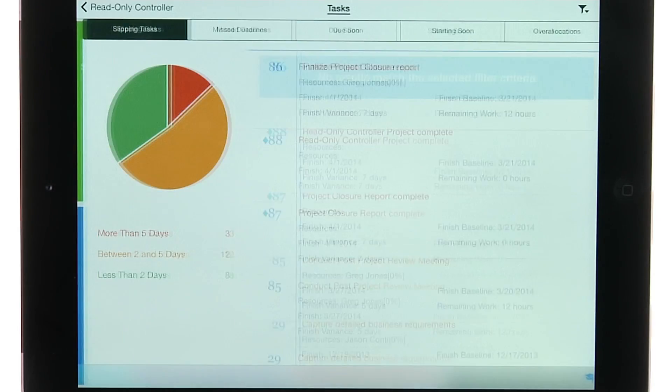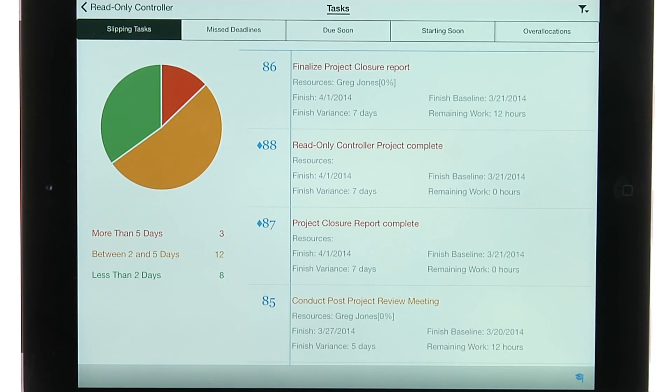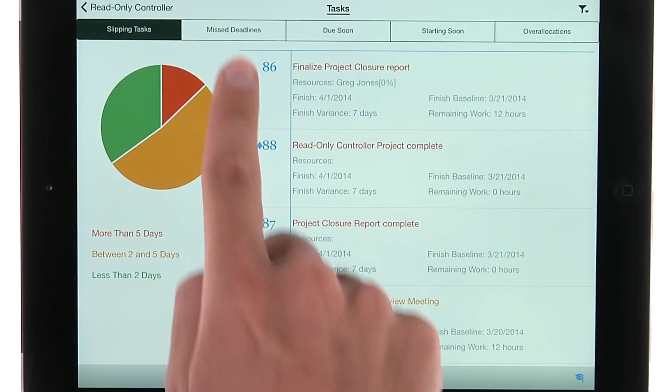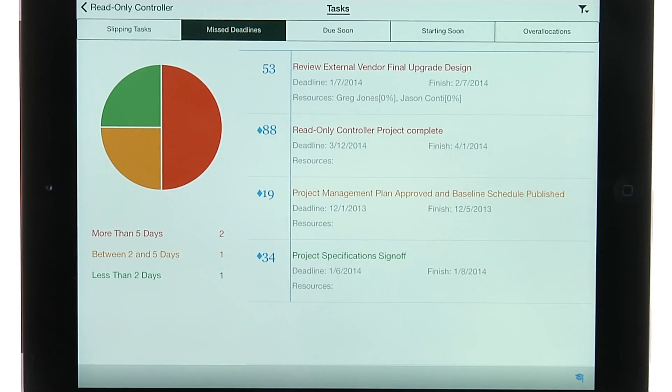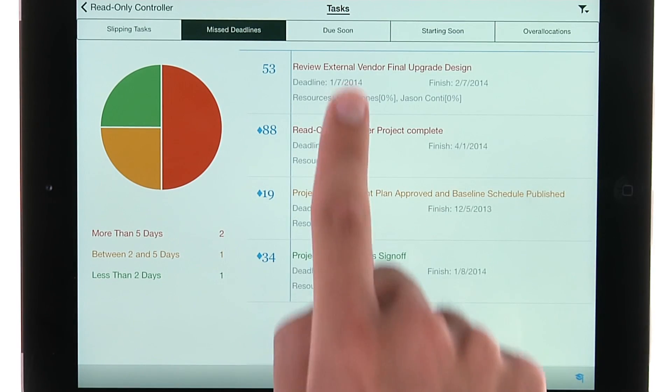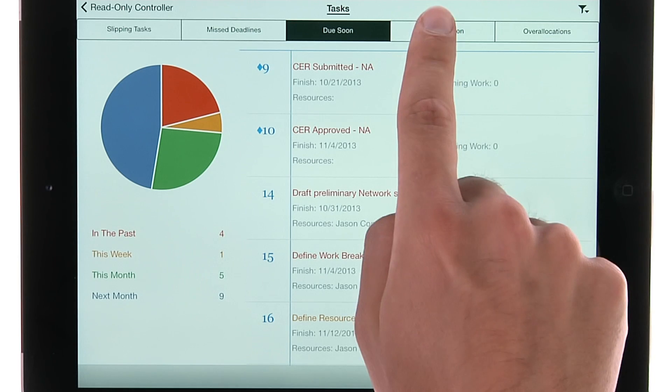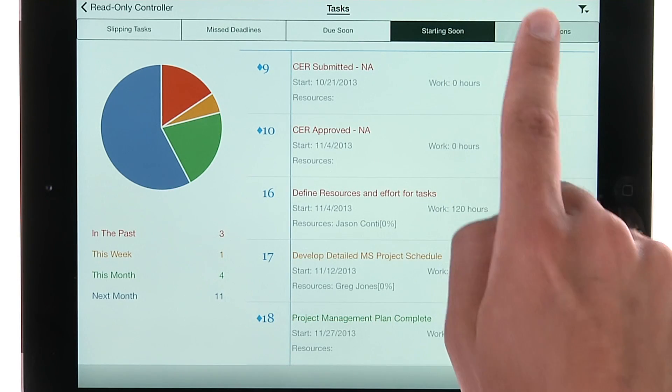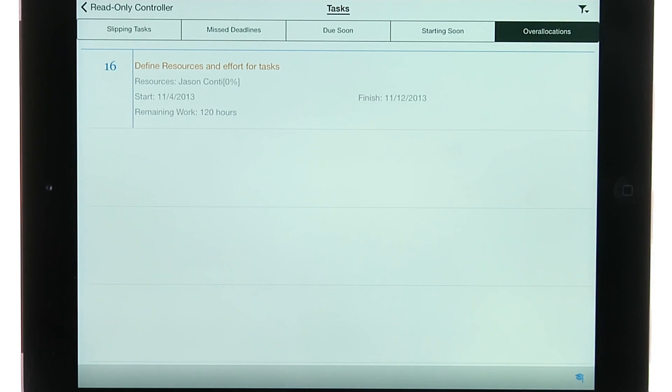Select the task tile to show detailed information from the schedule such as slipping tasks, missed deadlines, tasks that are due soon and starting soon, as well as over allocations.